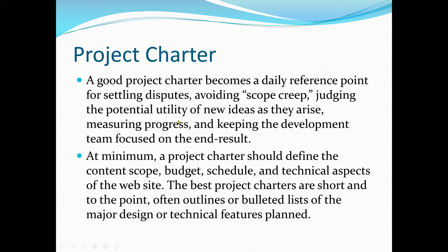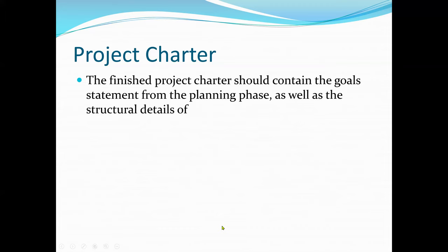A project charter also helps in judging the potential utility of new ideas as they arise, measuring progress, and keeping the development team focused on the end result. At minimum, a project charter should define the content scope, budget, schedule, and technical aspects of the project. The best project charters are short and to the point — often outlines or bulleted lists of major design or technical features planned. A finished project charter should contain the goals statement from the planning phase as well as the structural details.